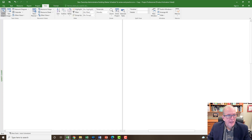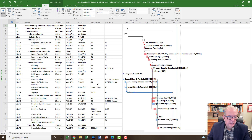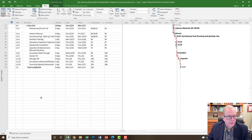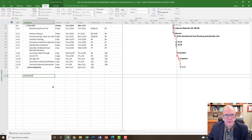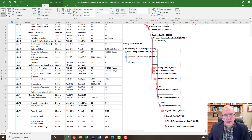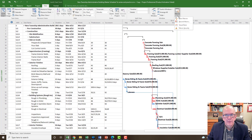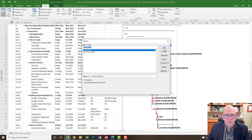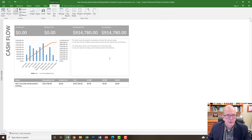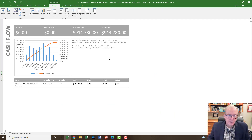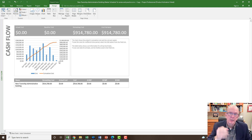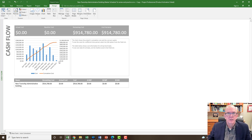I'm going to go back to the View tab, go to Macros, and click Stop Recording. Now if I go back to my Gantt chart and decide I want to see my cash flow report, I'd just go to Macros > View Macros > Cash Flow > Run. Done in one step. If there's a report that takes you time because you've customized it heavily, you could put all those steps into a macro and boom — report done, without remembering all those steps every time.